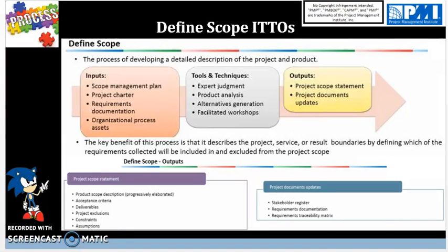Scope statement. This has 8 main components. Description, objectives, cost, which is coming from the cost baseline, time, which includes the schedule baseline, assumptions, what we assume to happen during a project when we are doing the project itself. We are assuming that all databases are up and running, all software, all systems are up and running. We don't have any major blackout periods. We have all available resources. No one is going to be sick, etc.